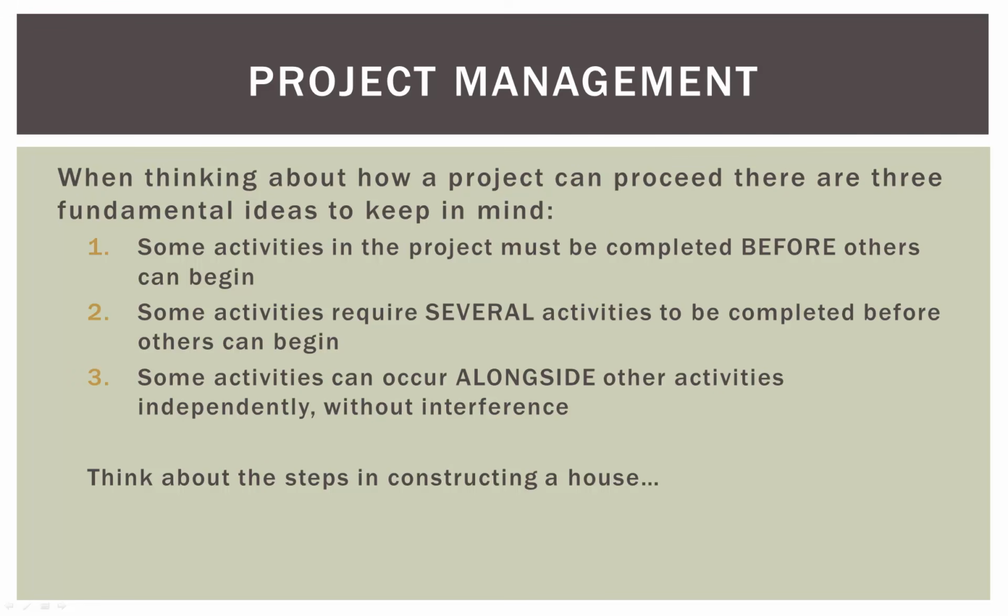Now, when thinking about how a project can proceed, there are three fundamental ideas to keep in mind. Some activities in the project must be completed before others can begin. Some activities require several activities to be completed before others can begin. And some activities can occur alongside or parallel to other activities independently without any interference.